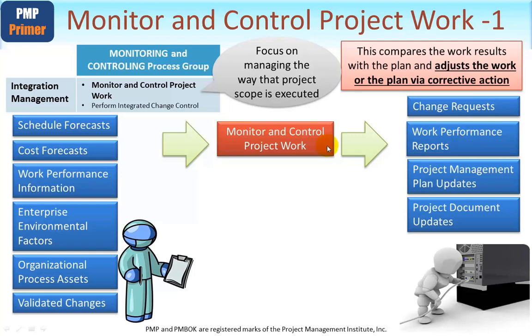As a result of monitoring and controlling actual work versus what was planned, it's highly likely also that the project management plan needs to be updated, and you'll remember the various plans within it, such as the schedule baseline, cost baseline, and so on and so forth. And in addition, whatever other project documents you have other than the project management plan, updates may be necessary there.